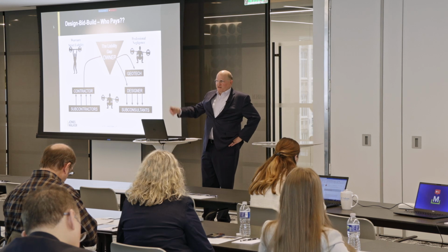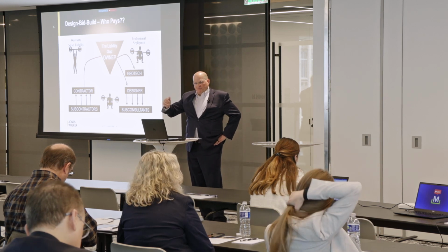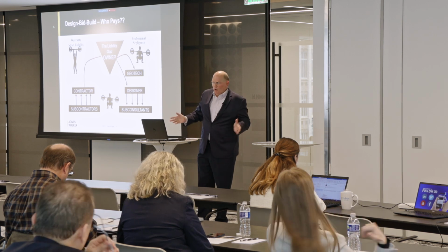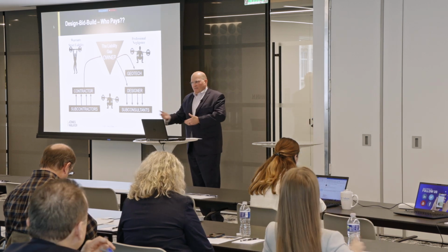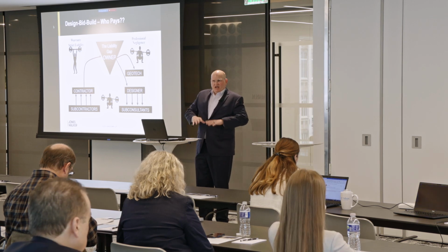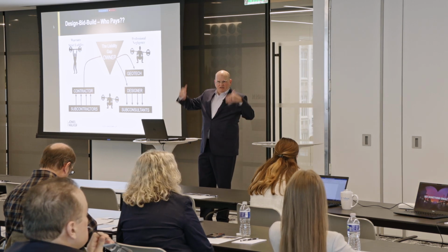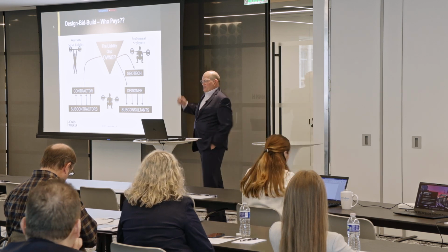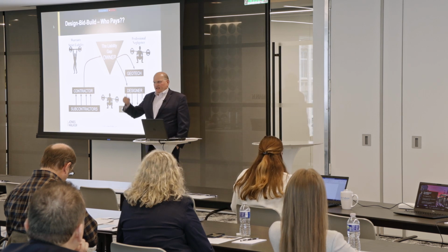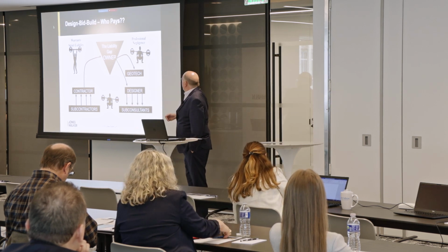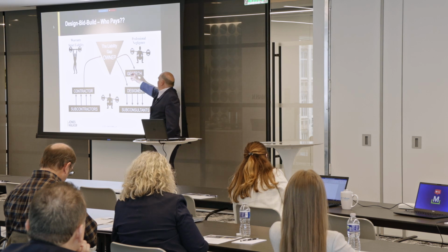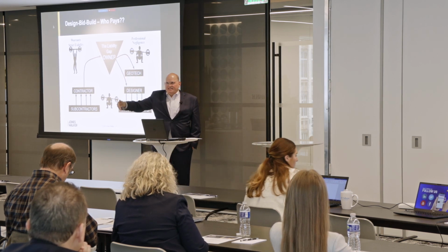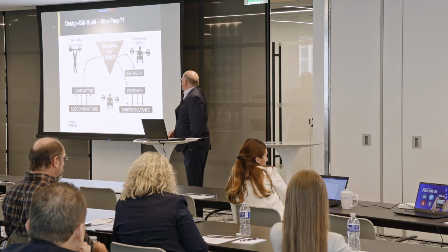It's a breach of the professional standard of care, whether it tracks the language in the contract or not. Typically the E&O underwriters are going to be wary if the design contract purports to set a higher standard of care, because that completely changes the underwriting and the potential liability there. So same thing, it doesn't matter if the liability gap is not covered if the owner has E&O coverage, because it's the same standard there.